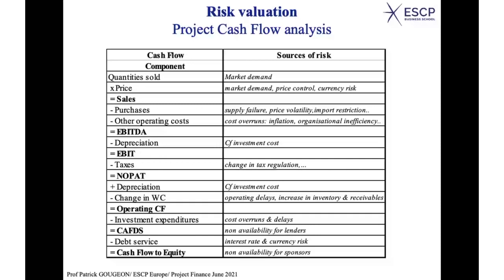Depreciation will depend on how much you have invested, so it depends on the investment cost. Taxes, you can have a change in tax regulation. Okay, change in working capital, you may have operating delays, increase in inventory and receivables, so that your working capital is higher than expected. Investment expenditures, as we mentioned already, you can have cost overrun and delays.